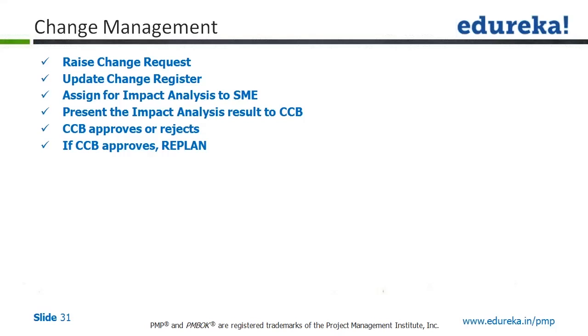So that means if the change control board has actually approved another 1 month extension to your project, then this 1 month activity would have an impact on each of the planning portions of your processes. And very clearly, you might have to replan those activities and bring all those activities back into sync to ensure you are matching up to meet those timelines.